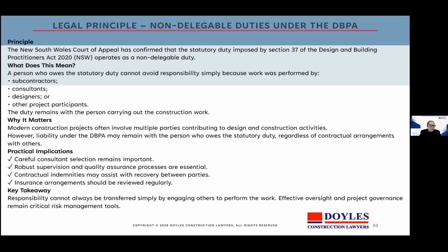So why does this matter? Modern construction projects often involve multiple parties contributing to the design and construction activities. However, liability under the DBPA may remain with the person who owes the statutory duty, regardless of the contractual arrangements with others. So it's important to be careful in your consultant selection, robust in your supervision and your QA. Contractual indemnities may assist with the recovery between parties, and insurance arrangements should be reviewed regularly.